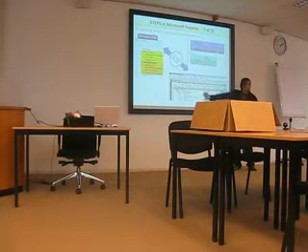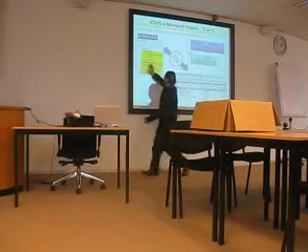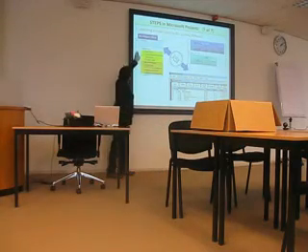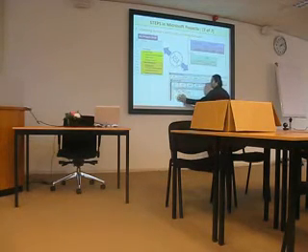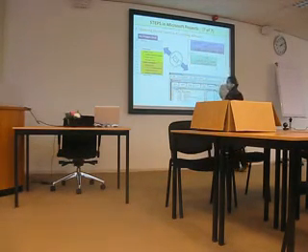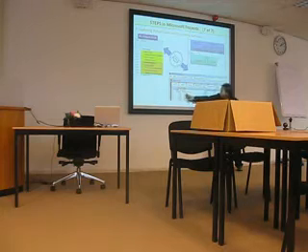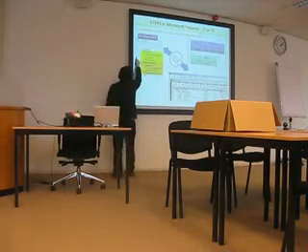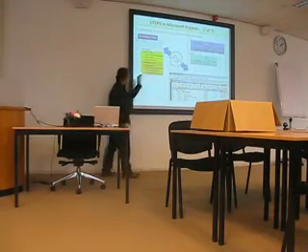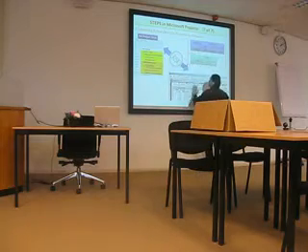This one is for accounting people, but this is for projects. We have the WBS, but they have what we call the COA, chart of accounts. Can you see that chart? The COA is 611000, but we have this one, the chart 112. We have to reconcile this one. This one belongs to what?